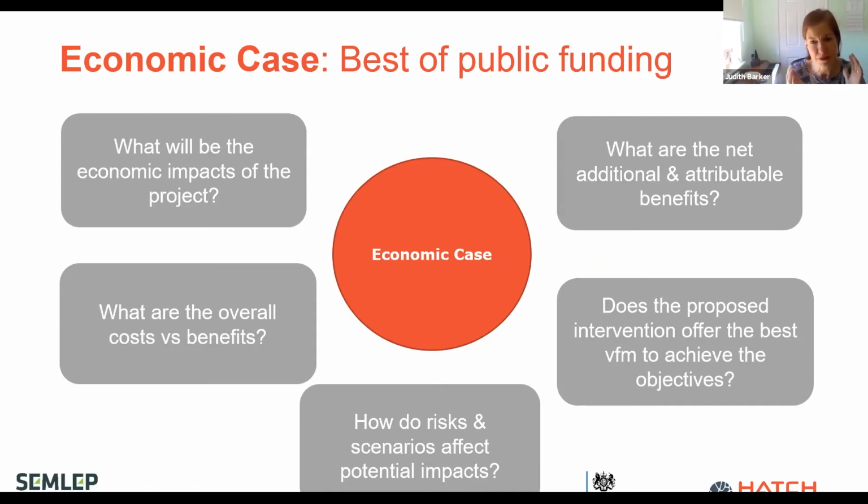And you're going to come up with some kind of ratio that says, right, our costs are this, our benefits are that. Although in the government guidance in November 2020 on the Green Book appraisal of business cases, they have made clear that the strategic case is just as important as the ratio of the costs and the benefits, it is still really compelling to be able to demonstrate the level of benefits and the value of those benefits that you're delivering. So it's certainly something that's really worth looking at and maximising, because